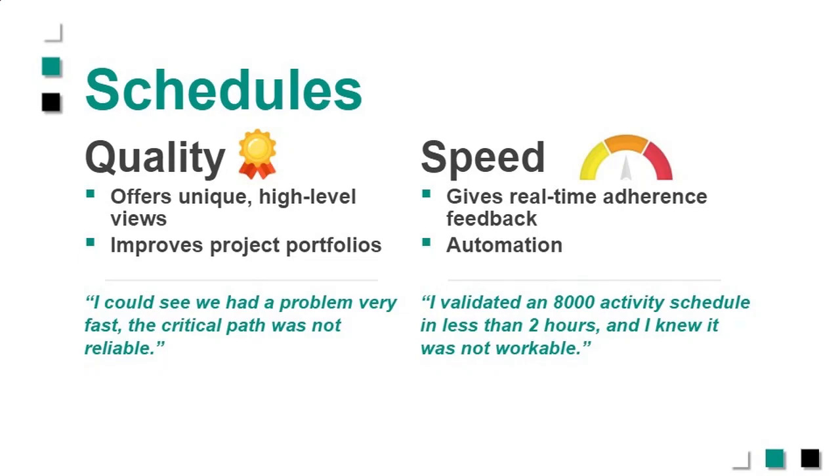We could see very quickly that it's not a workable schedule. It had no critical path. It had tons and tons of open ends. It had a huge amount of constraints. So he would never have been able to figure all that out on his own. He didn't have the skill set. So this is the kind of thing that you can use this tool for very quickly.